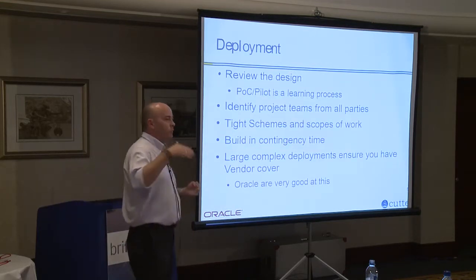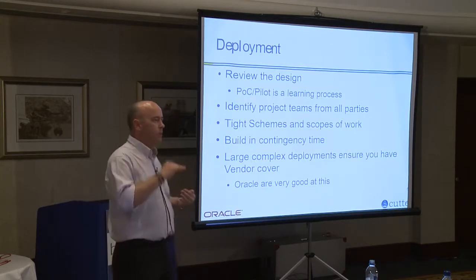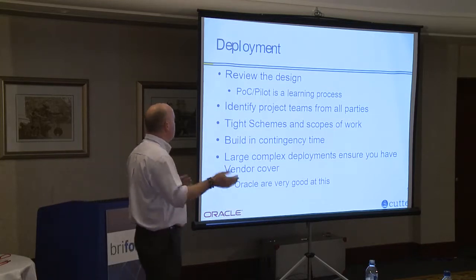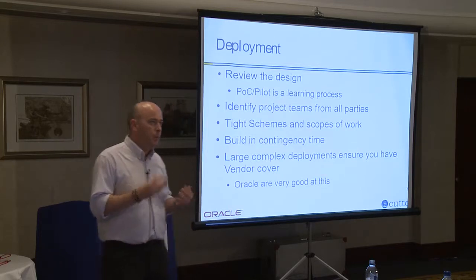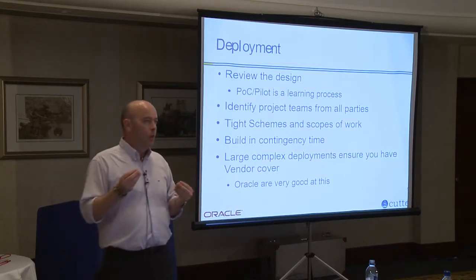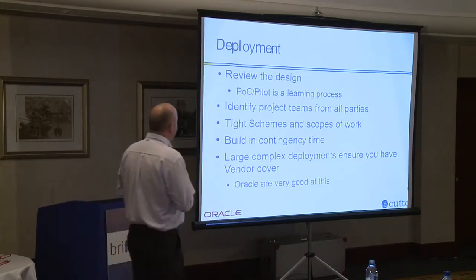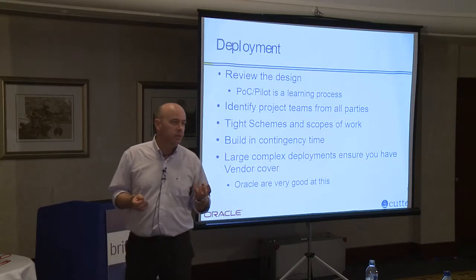A lot of this will seem obvious, and you'll be sat there thinking, well, yeah, that makes sense. You'll be surprised how many people don't go through these kinds of processes when they're looking at deployments. Review the design. As I say, it's an ever-moving target, and things will be pulled out from the POC and pilot that will dictate how that final deployment is going to look. Key is to identify the project teams from all parties, and that includes independent software vendors as well.